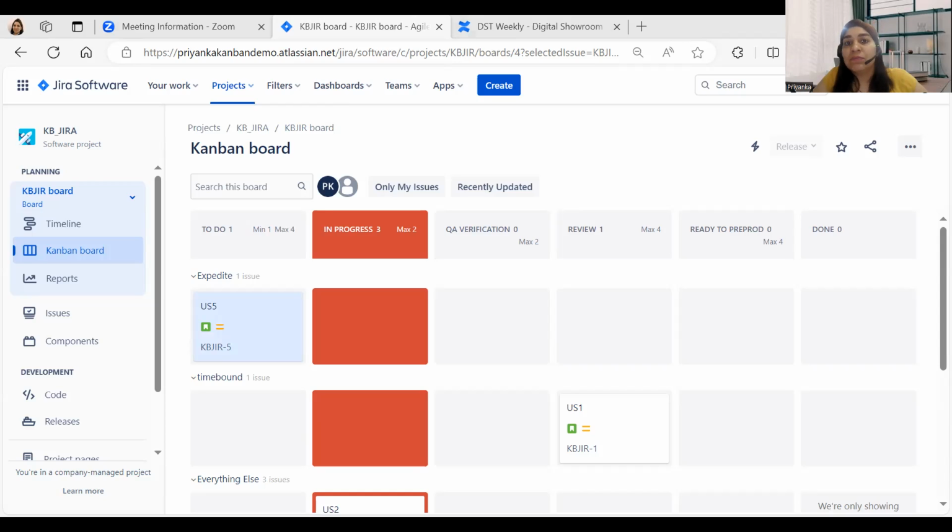Now, the next question that could come to your mind is, can we go against the rules, and can we go above the WIP limits that we have defined? So again, there is no right or wrong answer to that. The answer could be yes. Once there is something really urgent that you need to work on, you can exceed these WIP limits. But with that, you cannot say that everything is urgent and then always change WIP limits. You need to define explicit policies for the various reasons when we can call a particular ticket urgent, and you can define those policies at the beginning of a project.